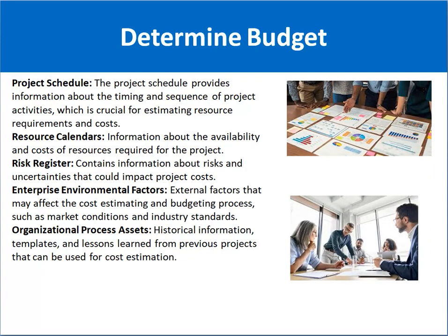Then next is the project schedule. Project schedule basically provides information about the timing, the duration of activities, and who are the assigned resources, which is basically crucial for estimating resource requirements and cost as well.